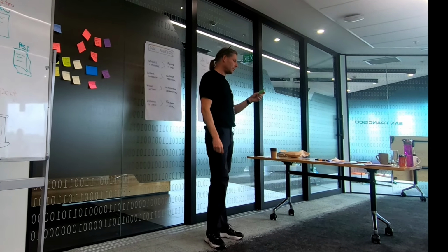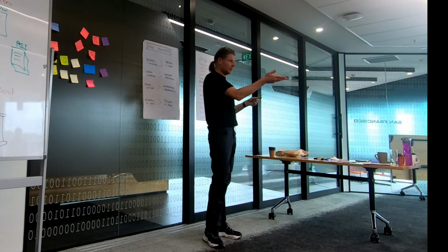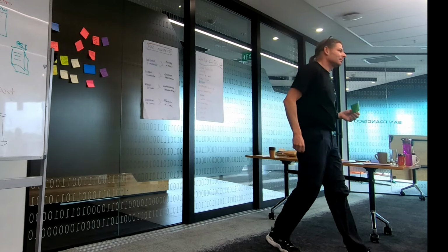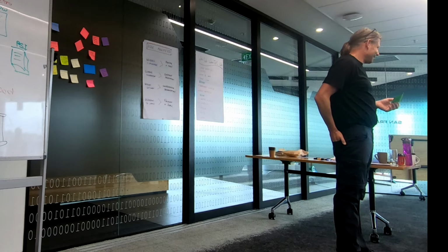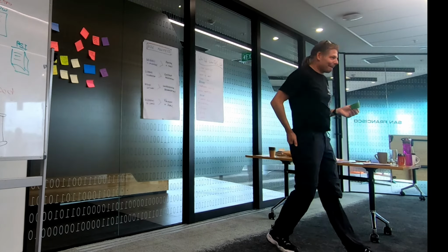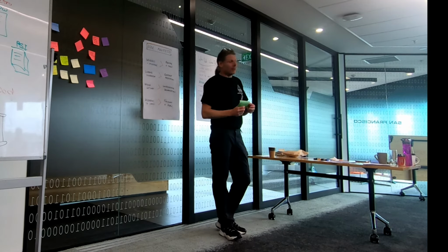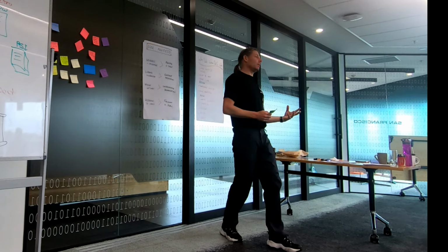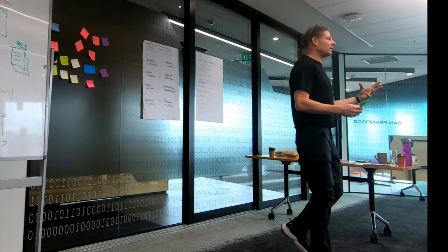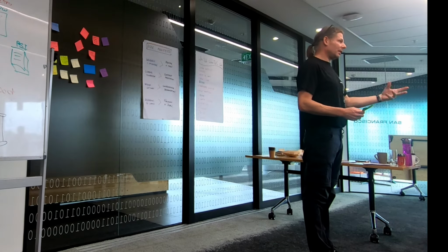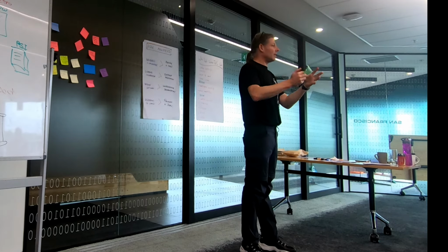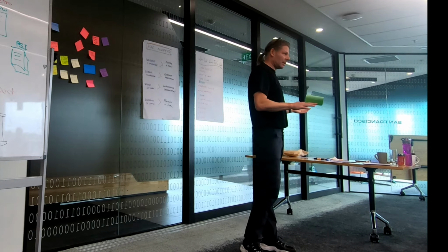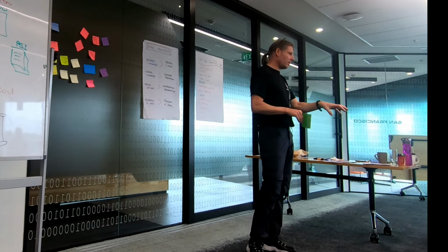Why only delivery teams follow Scrum? Who asked this? Well, firstly, is that a true statement? Maybe, I heard some teams don't follow something. Well, okay, so the platform teams generally follow Kanban. But not even properly. The difference is Kanban uses WIP limits. And especially with ops and SRE, because they're constantly changing, you can't plan the next 2 weeks ahead. So Kanban is more appropriate for those teams.